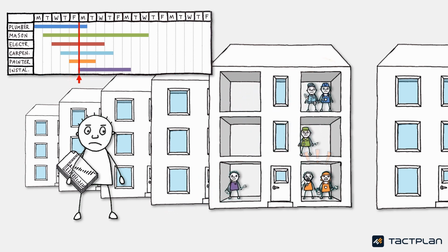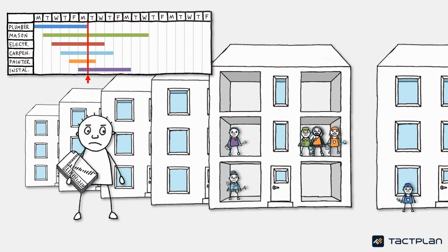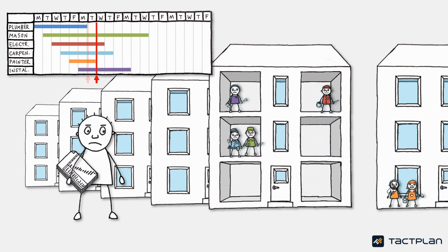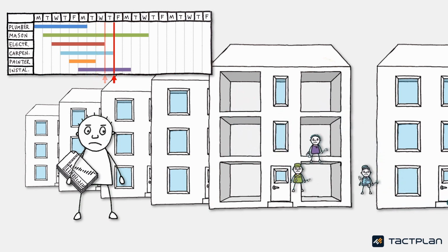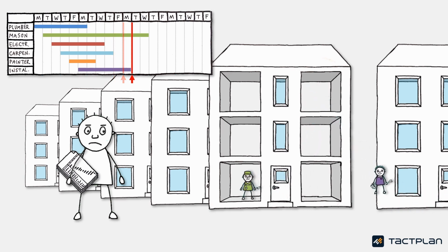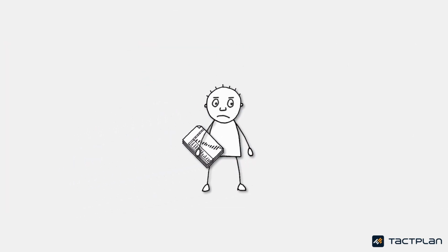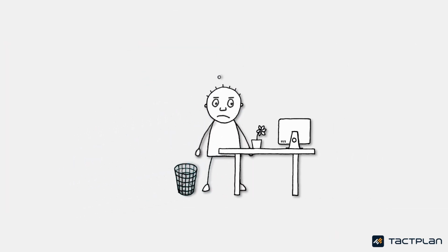When construction teams are unable to follow the plan for some reason, they often start working in random locations, wherever there is available space. This can lead to overcrowding in certain areas of the construction site, while other work zones remain empty. As days pass, conflicts and delays accumulate, resulting in inefficiency and disorganization. This, in turn, leads to escalating delays and additional project costs.